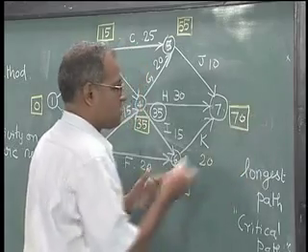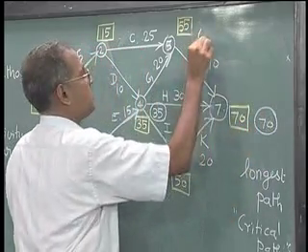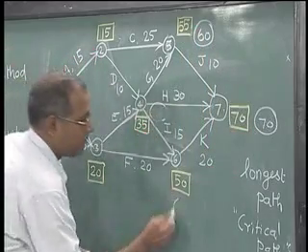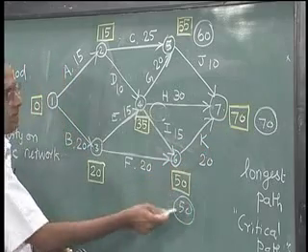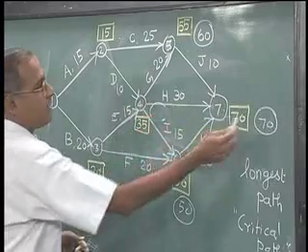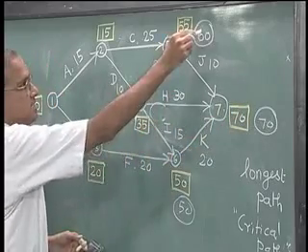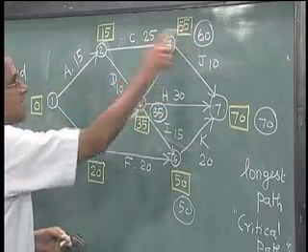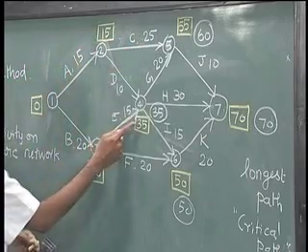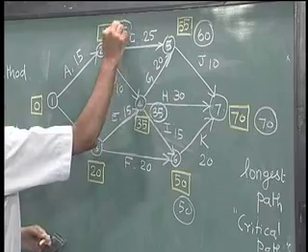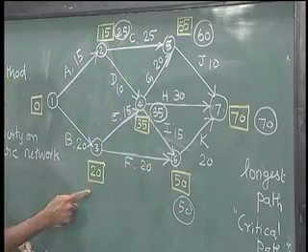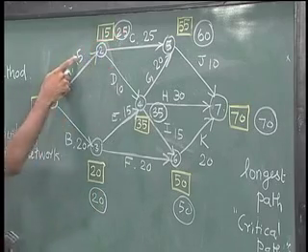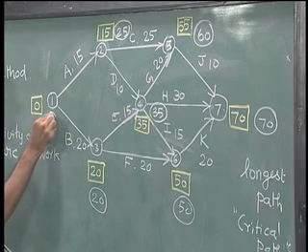So, we start with a backward pass of 70. So, this becomes 60, this becomes 50, 70 minus 20 is 50, this is 50 minus 15, 35, 70 minus 30 is 40, 60 minus 20 is 40. So, the smaller one comes here as 35. This is 60 minus 25, which is 35, 35 minus 10, we get 25. This is 50 minus 20, 30, 35 minus 15 is 20. Here we get 25 minus 15 is 10, 20 minus 20 is 0.